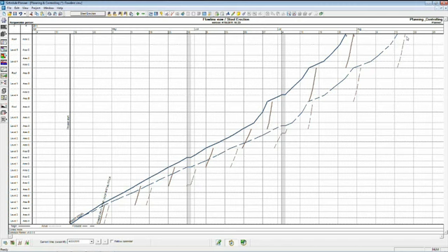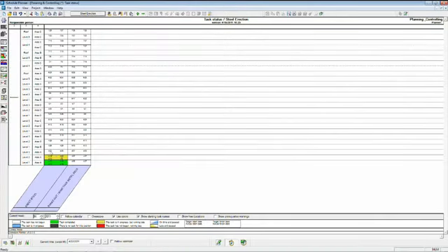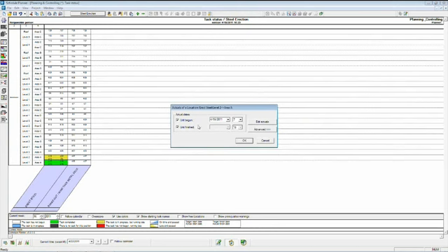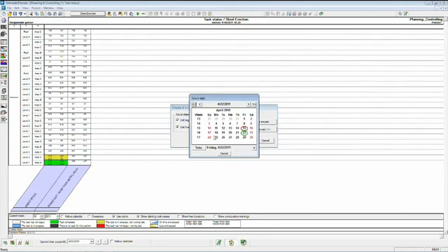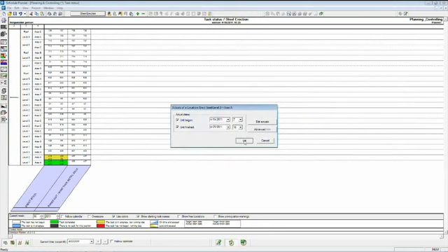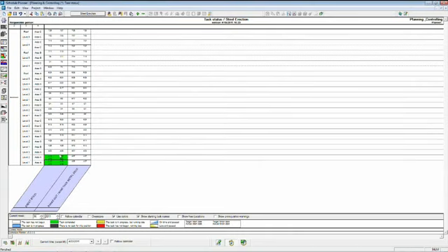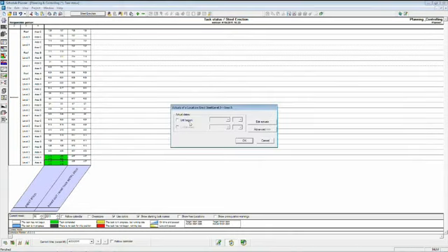Now, this was only after 1 week. Obviously, it's a small sample size, but the function remains the same. That week after week, you're going to start collecting your actuals. The program is going to forecast based on those actuals. Let's say level 2 was actually completed the following Monday, not Friday. So it's now complete, but it did come in late.